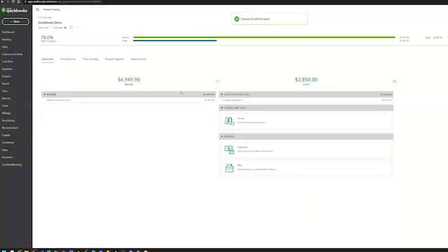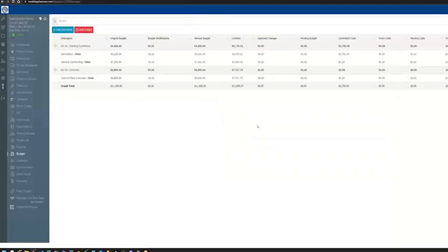And if I go back to my project, this is where we get into synchronizing costs back from QuickBooks. Currently, it is a daily process that happens every night automatically, but the user can do it manually at any time. As soon as it synchronizes once, it's not going to synchronize that again unless it changes. So you can see that direct cost here.